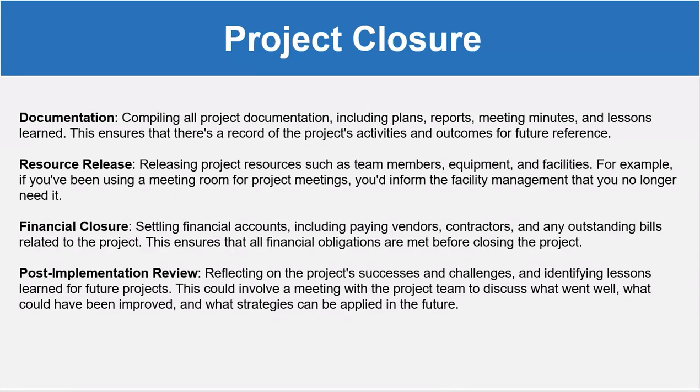Next is the documentation. That means all the required documentation, like project plans, reports, meeting minutes, lessons learned, scope of work, functional specifications, and any design specifications, has been prepared and delivered to the customer, and there is a record of the project activities and outcomes for future reference as well.